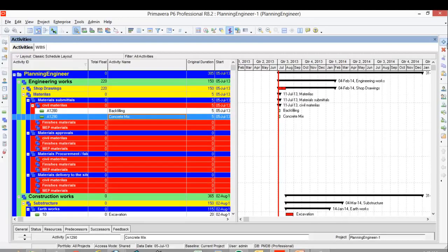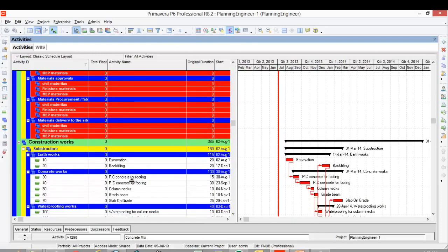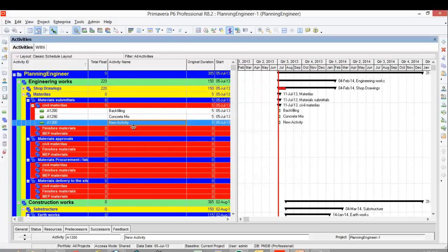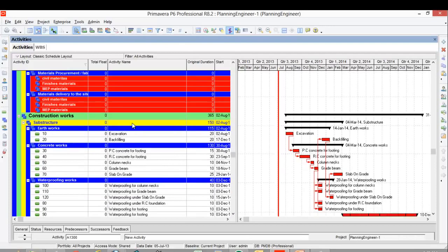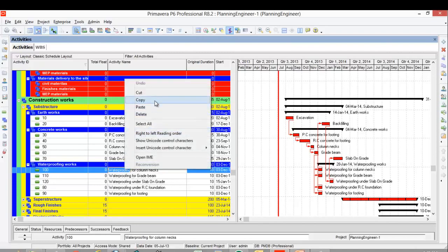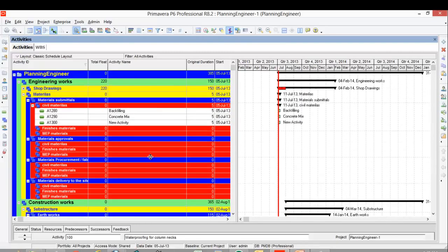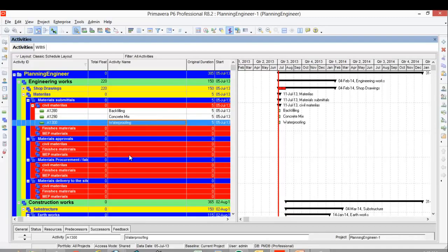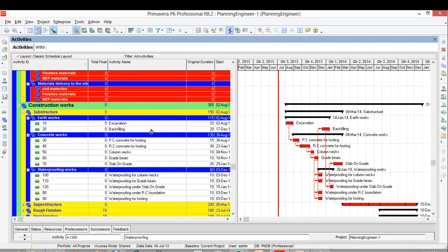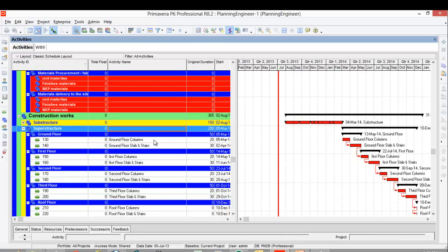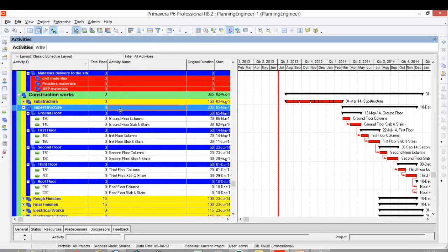We have here steel work. Reinforced steel is usually standard steel, so we're using just an approved one. I don't think we should add it. We have the waterproofing. This waterproofing material should be submitted and approved. Then we finish the substructure. In the superstructure, it is all concrete, so we don't have any materials.